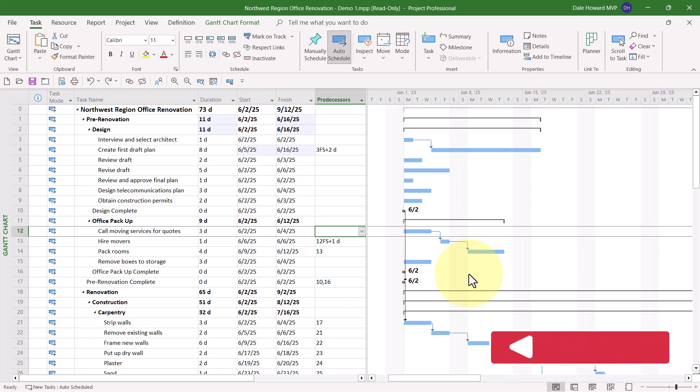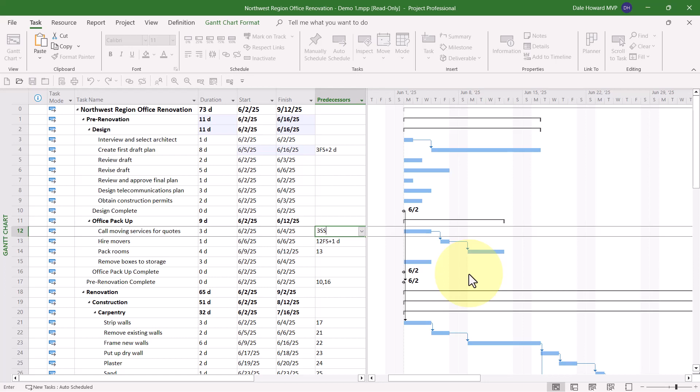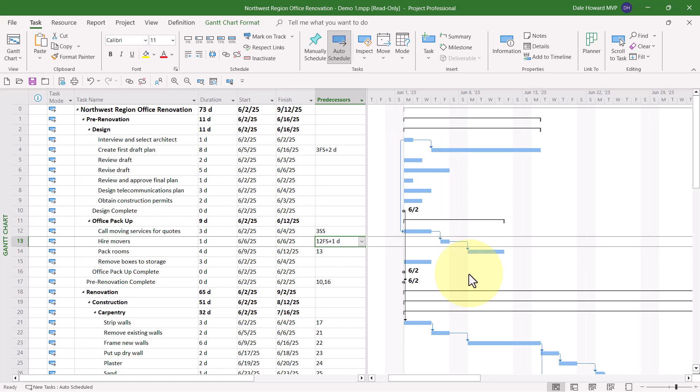For example, what I want is the Predecessor to be task number three, but with a start to start dependency. So I type three, S as in Sam, S as in Sam. And when I press the Enter key there, it sets a start to start dependency between those two tasks. That's my second trick on setting task dependencies.